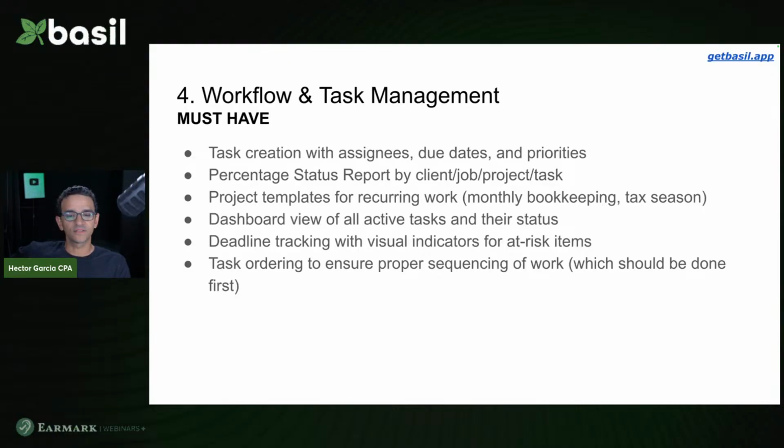Having project templates. For example, let's say I do recurring monthly bookkeeping work, and I have my tasks, and inside my tasks I have my checklist, and inside my checklist I have documents that are required and not required. They're going to be sent to the client, and inside that there are also preset messages I'm going to send to my client via the portal, for example the communications portal. So having a template with all that done, when you bring in a new client or a new project, you just select the template and boom, it presets everything for you.